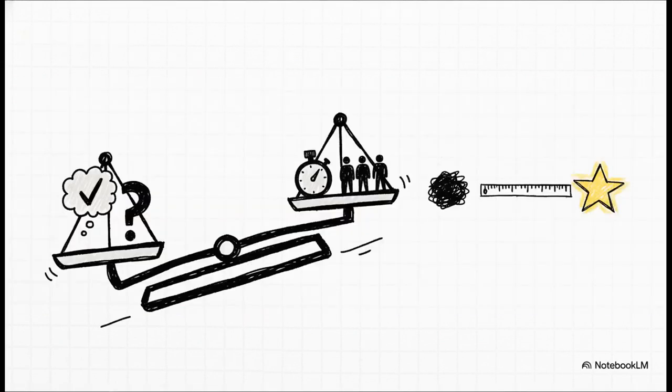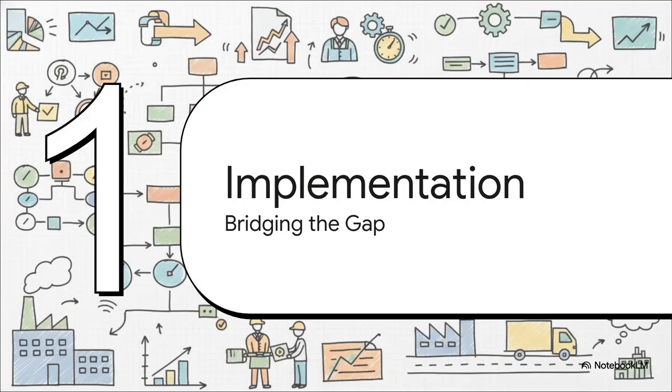But how do we actually track this journey? Well, we can't just rely on arbitrary numbers, because people will just gamify them to look good. Instead, we use qualitative guidance. You have to ask, to what extent is this recognized good practice actually happening in reality on the floor? The more consistently it happens, the closer you are to the ideal. But of course, at the same time, you do want to track hard metrics like total lead time, actual processing time, and the number of people involved, just to make sure the true efficiency of your output is actually moving in the right direction.